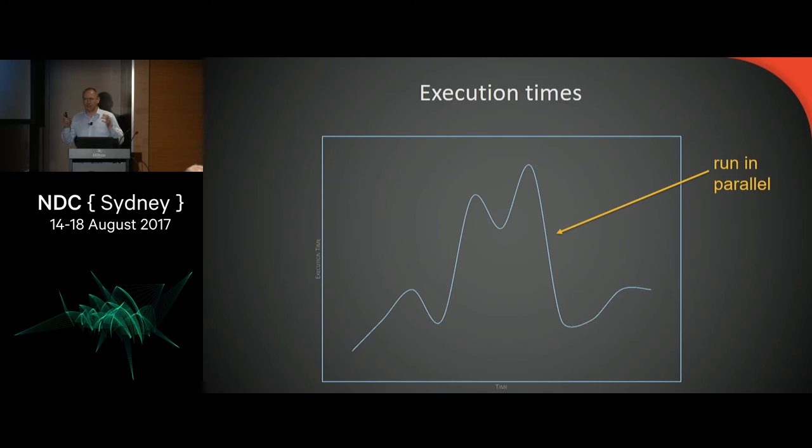And we said, this is working really well. Let's add tests for everything in our platform. So together as a team, we had a whole sprint where all we did was write tests. Now, we didn't try to go for 100% coverage. We had automated unit tests as well. What we did go for was 100% happy path coverage.